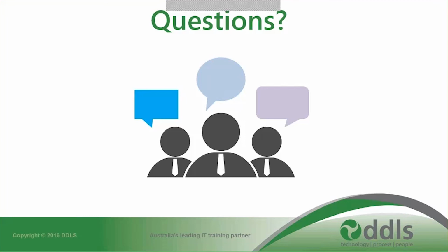Louisa, we've got another question coming in from Ditto. Can you run telecommunication networking engineer projects with Agile? It depends what you're doing. I've previously worked for Optus, and we had infrastructure projects. I even used to be a Unix administrator, and we could do those in Agile only because you knew how to break it up into chunks. You have to have the ability to break up that work into chunkable sizes. If you're going to tell me, Louisa, we can't break it down into sizable chunks, and that there's no priority order, if we have to do it all anyway, then perhaps not. So I'll have to take a look at what that project entails and whether it is good or not good for Agile.